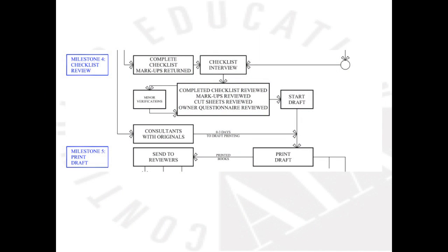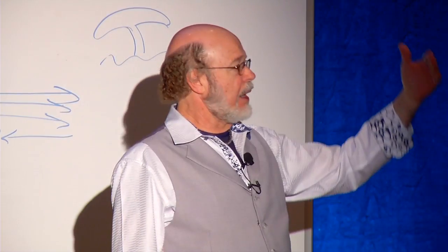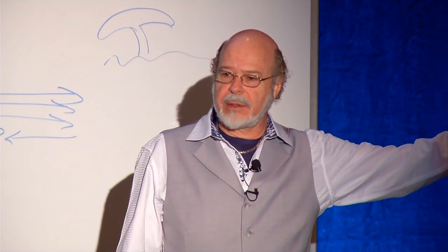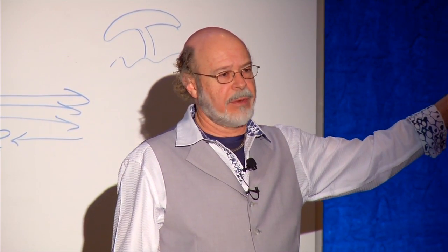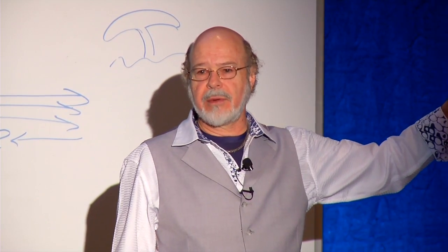So anyway, we go through the process of the checklist, and this is where now we've had the interview, which is a sit-down 2-hour interview approximately. I allow at least 2 hours for it. Some take a little less, some take a little longer. And then I hand it back to him. This is where he comes back with the completed markups of the checklist. And I actually get to start work here. This is where I really start work. And basically, I'm 3 weeks from the draft, and I'm starting work on the project, ground zero.